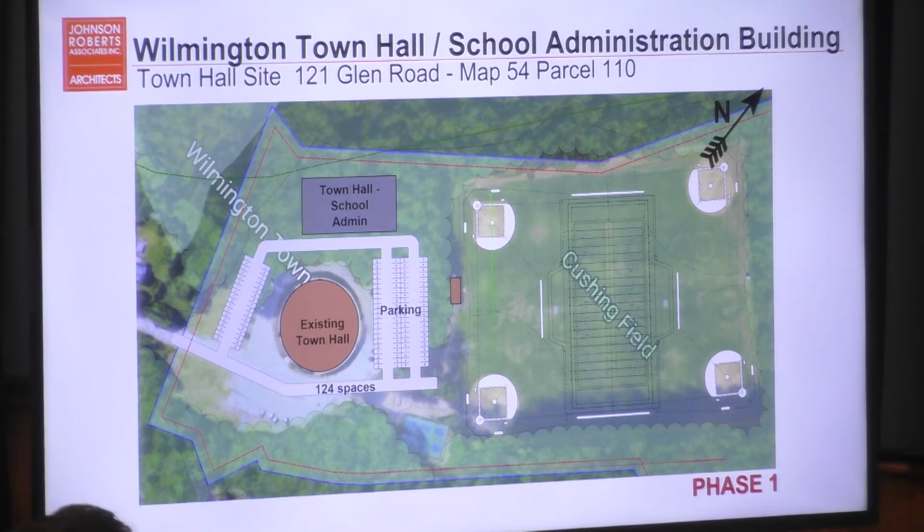But what we're showing here is that you're going to end up getting your circulation path in there, and some of the parking. Your existing town hall is going to be there, operating on a day-to-day basis while they build this new building. People are going to have to come in and use the play fields and so forth, so it's going to be a security issue. It's going to add a little time to the project, and a little cost. Those are all things that we can work out, I'm sure.